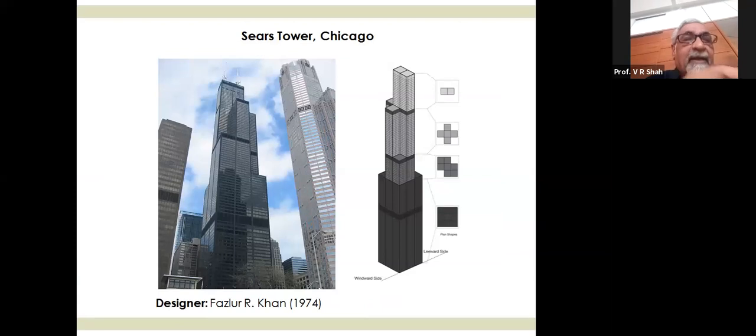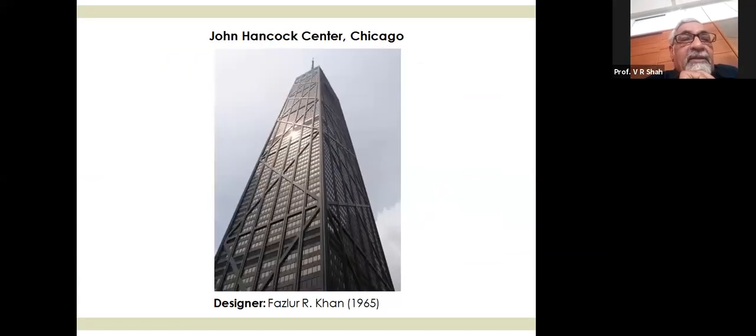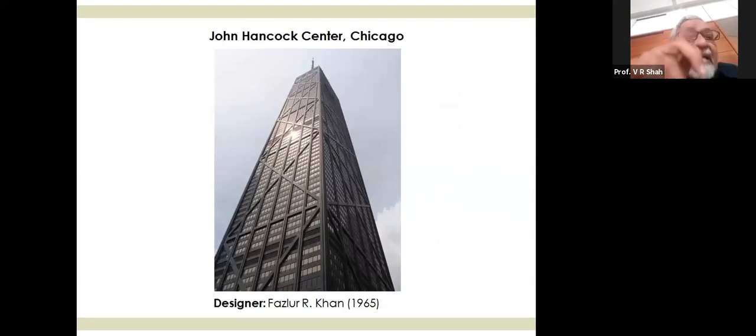Hans Isler created funicular shell structures by suspending cloth to find the form — unlike hyperbolic paraboloids, these could achieve very long spans. The Sydney Opera House is a landmark example of architect-engineer collaboration. The architect Utzon's entry was initially rejected by the jury, but was ultimately selected. Arup's team, including Peter Rice, recognized it could not be built as drawn since the shells were very tall, so it was restructured as a grid. Despite tremendous construction challenges and cost overruns — at one point Utzon was removed from the project — Arup completed it.